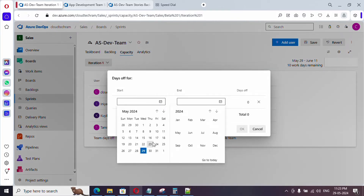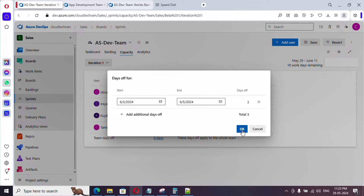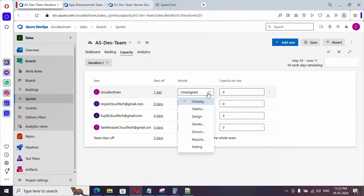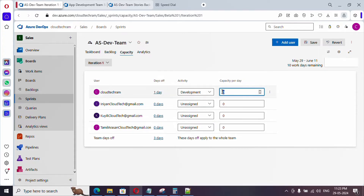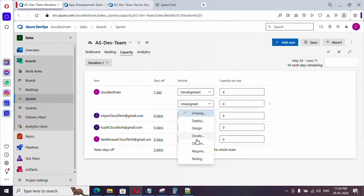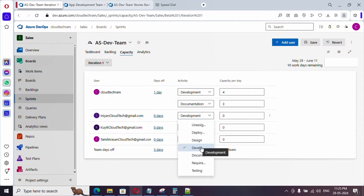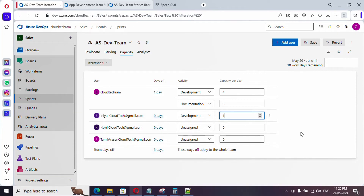If the entire team is unavailable — for example, on a public holiday — select Team Days Off and add the dates. For example, the team is unavailable from the 3rd to the 5th; click OK. For each person you set the capacity per day — for example, a person working on development for four hours or seven hours per day, depending on the team. The same person might also work on documentation for three hours. If a person is on another team, they may only be available for one hour of development per day.